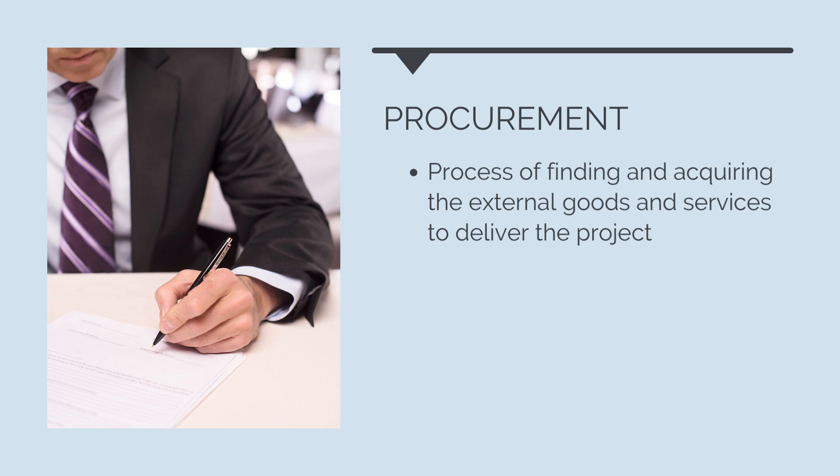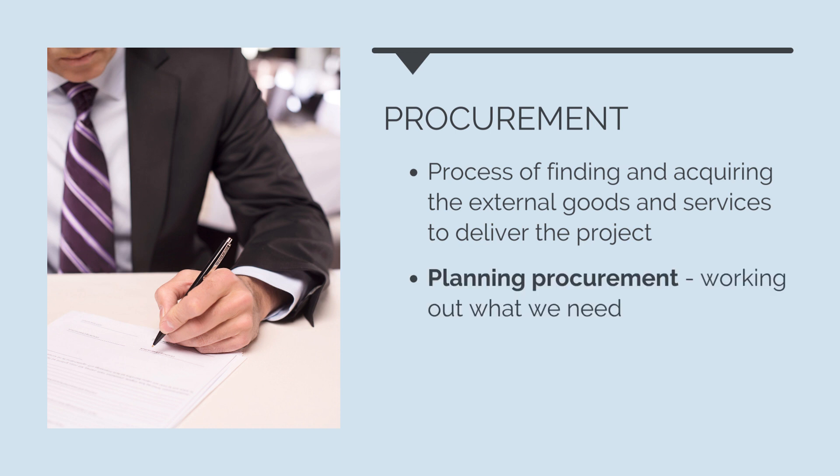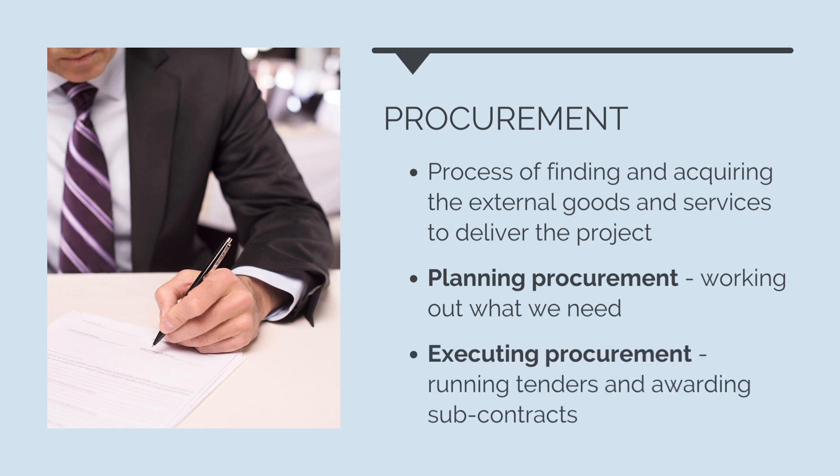This occurs in two stages: planning and executing procurement. Planning procurement requires us to work out what we need to procure. It involves developing the procurement strategy and working out what subcontractors we need. Executing procurement is then the process of creating tender packages, running tenders and awarding subcontracts.